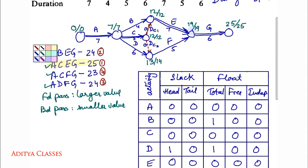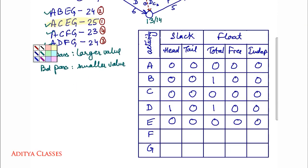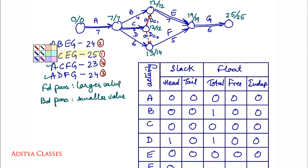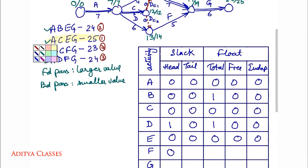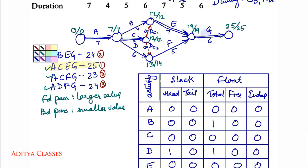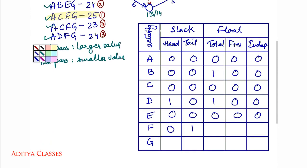For activity F: head slack is 19 minus 19 equals 0; tail slack is 14 minus 13 equals 1. Total float: 19 minus 13 minus 5 equals 1. Free float is total minus head: 1 minus 0 equals 1. Independent float is free minus tail: 1 minus 1 equals 0.